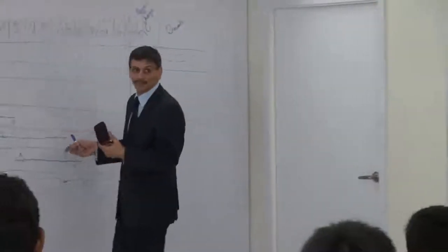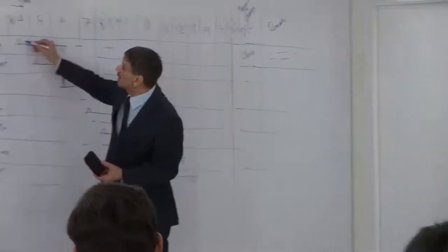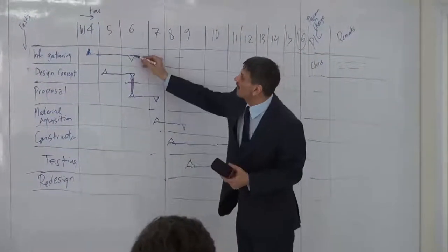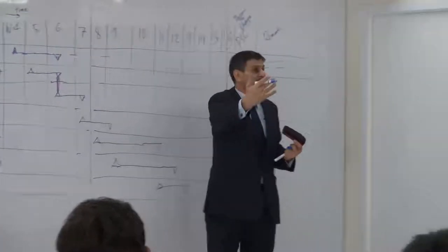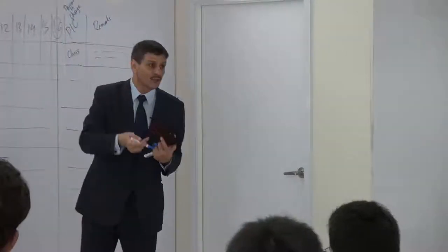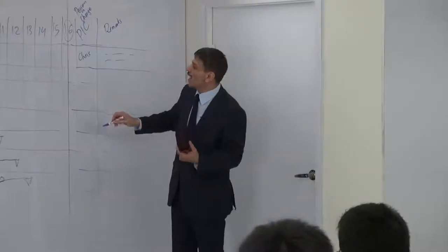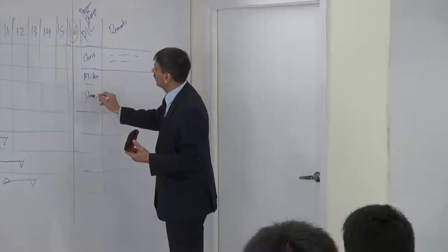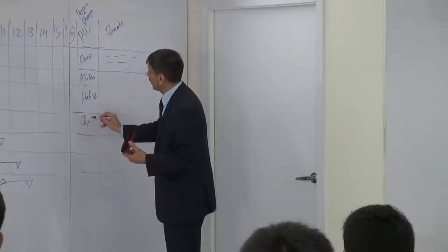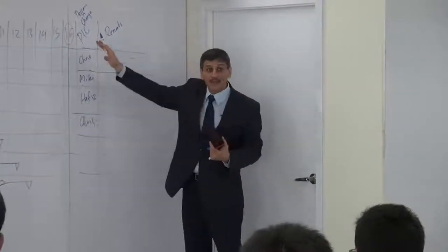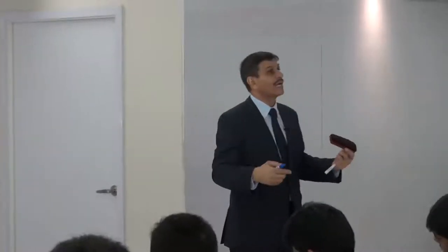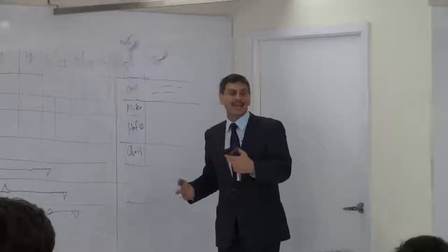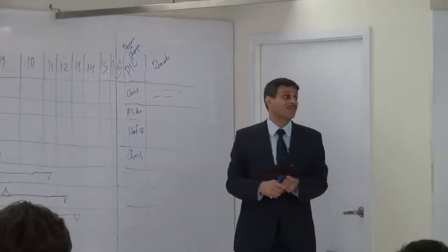So as you move on, this is a living document. When you start, you shade it. You finish on time, you shade it. If you have to change it, communicate it, not only to your team members, but also to me. And here, if you have, this is Mike, this is Hafiz, this is Chris again, then it's very easy for me to see if anyone is maybe not necessarily doing his or her job, or maybe anyone needs help or assistance so that they can do their job, rather than everyone claiming that everything is okay, but the team is not really progressing.